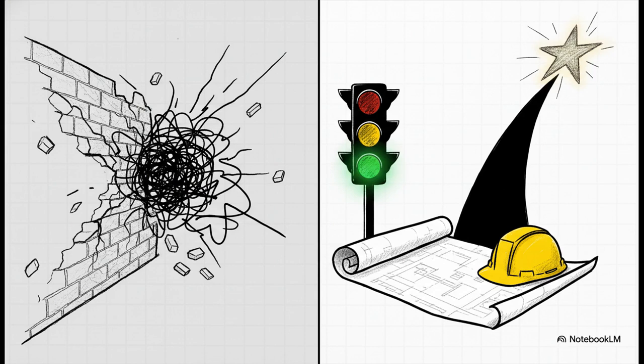To put this into perspective, think about the cost of making changes. If you make a 10% change in design during this upfront initiation phase, it might cost you a few hours of engineering time. No big deal. But making that exact same 10% change during the construction or execution phase, that could literally cost you millions of dollars and set the project back by months. This is exactly why structured methodologies like PRINCE2 and PMBOK absolutely insist on a formal green light decision before you allocate any major planning or execution resources. Simply put, if a project doesn't start correctly, it's statistically unlikely to finish successfully.